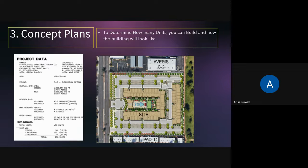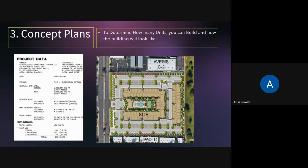One important concept is to maximize the number of apartments you can build on a land. For example, if the land cost was 10 lakh rupees and you're building 276 units, your per-apartment land cost is lower. If you end up with only 250 apartments, your land cost per apartment is higher. Since you budget per apartment and sell per apartment, you have to make sure your economics are viable. Maximizing the site should be a major factor in multi-family development.